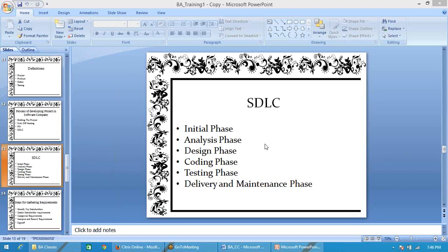Then, we were discussing the initial phase, right? The roles involved in this particular phase are your business analyst and the engagement manager. And the process is like initially the business analyst is supposed to go to the client and with an initial meeting he is supposed to gather the requirements, and whatever the requirements gathered from the discussion he is supposed to mention under a particular format, and that format is called BRS, Business Requirement Specification Document, which is prepared by your business analyst. Business Requirement Specification Document, BRS. Yes, exactly, specification.